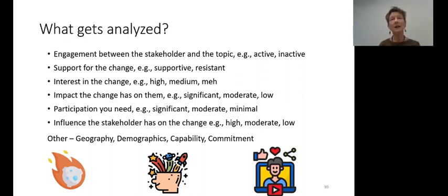It also helps you understand more about the particular stakeholder. What are their competencies? Are they committed? Are they interested? Do they have specific requirements that should be considered as part of what you're doing? And then you're also going to think about what their influence is over this initiative. Who are the folks that can change the way things happen? You can also look at where these people are located, so their geography. Are they all within the province of Alberta? Are they all within this time zone? Are we talking staff that have worked here for 25 years and staff that have worked here for 5 years?